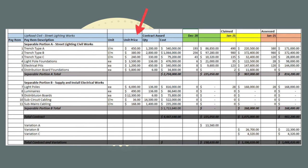Under the green section, we have what was previously claimed and paid to the subcontractor for their December works. In December, we paid Uprod Civil $238,610. This was because we assessed they had completed 193 metres of trench type A, 256 metres of trench type B, 43 metres of trench type C, 6 light pole foundations, and 8 electrical pits, as well as an approved variation of $13,560.